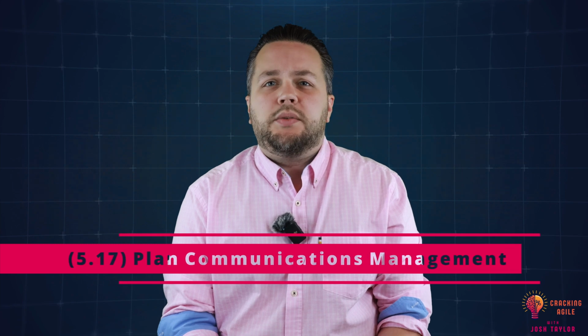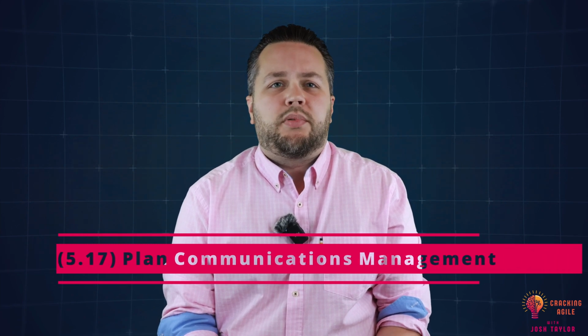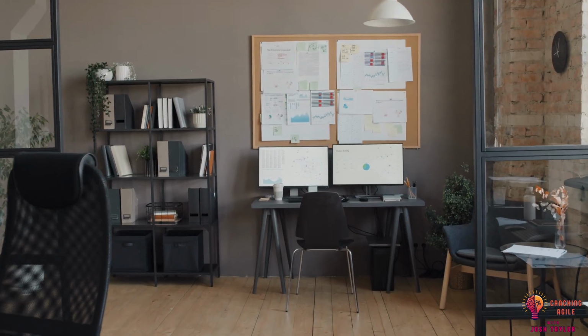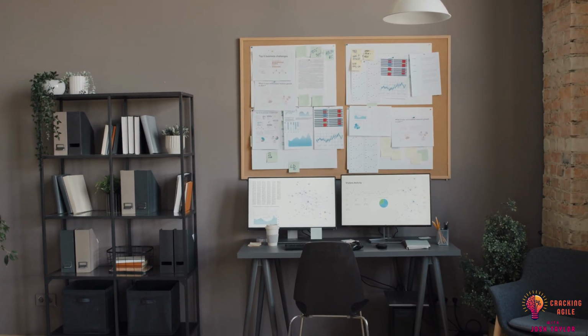Speaking of which, you're going to need to start communicating with your project team and stakeholders about the information you've discovered so far within the planning process group. Planned communications management contains your approach to communicating with the folks interested or impacted by your project. You'll need to document the what, how, and who you'll communicate to throughout the project. Stakeholders should be able to look at your communication plan and determine when the next project update meeting will occur and how they're able to access the information radiators.